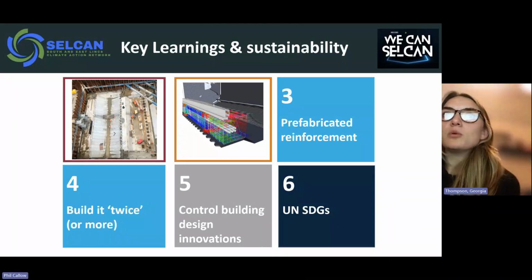So we used some key learning from the agency's Ipswich barrier team, where they cast their gate on site. It was suggested to us as a key learning point that prefabrication, doing it off site and then pulling it onto site and putting it into place, could simplify the process. So we made some 3D solutions, and we generated those 24 precast units off-site, and it enabled us to install them in 3 days, which took a lot of time off the programme.